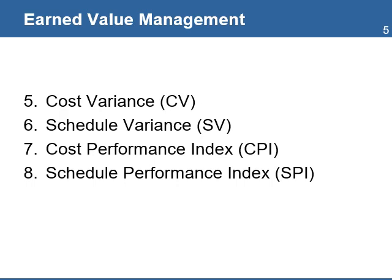Schedule Variance shows the difference between the planned and the actual completion of work. It is calculated by deducting planned value from earned value. Cost Performance Index, or CPI, is the ratio of earned value to actual cost, and is used to estimate the projected cost of completing the project. Schedule Performance Index is similar to CPI, and is used to estimate the projected time to complete the project.